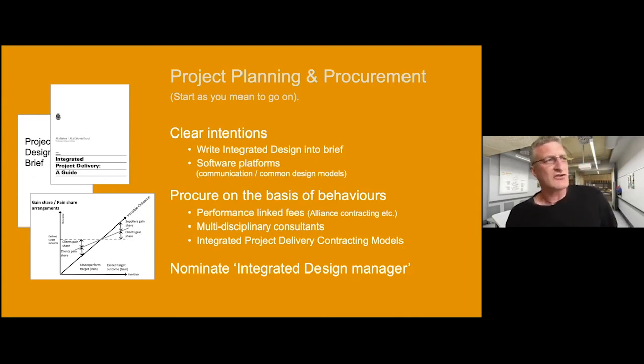And that document at the top, their integrated project delivery, is actually a document put together by the American Institute of Architects, and that's a whole integrated design project procurement framework. So it's essentially alliance contracting with mandated BIM to make sure everyone's communicating and using the same design models along the way. So there's a lot of information and knowledge out there on the procurement side.